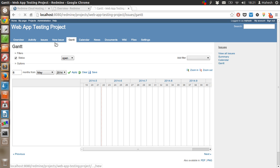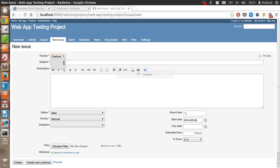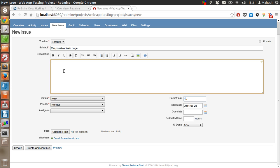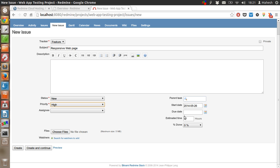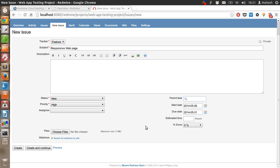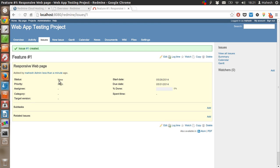Let's create a new issue and see if it appears. If it's a bug, choose bug, or feature, or support feature. Let's have it as a responsive web page. Status as new, priority will be high, and due date will be the end of the month. Percentage time zero. Now let's create this feature issue and see if it appears on our project.